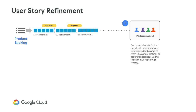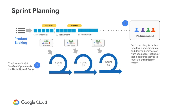Refinement is a collaborative activity. It's very important that the product owner, API architect, and QA engineer all focus on the same set of user stories in the priority order of the backlog. After they are done refining sprint 1 stories, they move on to sprint 2 and refine that set, continuing until the backlog is all refined. Once a set of user stories in sprint 1 is refined, sprint planning starts as either a recurring activity before the sprint in small chunks, or one larger session at the first activity of the sprint.